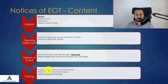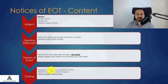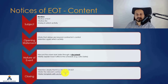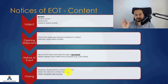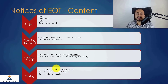Finally, you have the closing part of the letter. You state that this is a Notice of Extension of Time and refer to the relevant contract clauses — both the notice clause and the extension of time clause. You can download the template from this lecture.